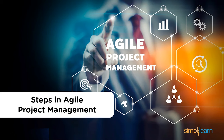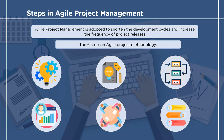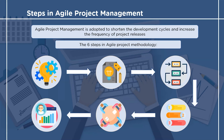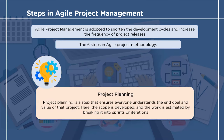We shall now see the steps in agile project management. The goal of agile methodology is to produce shorter development life cycles and more frequent product releases than traditional waterfall project management. We will now check six steps in agile project methodology. The first step is project planning, which includes feasibility study, development of scope, breaking the project into executable tasks or sprints.